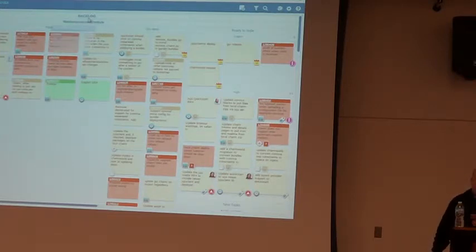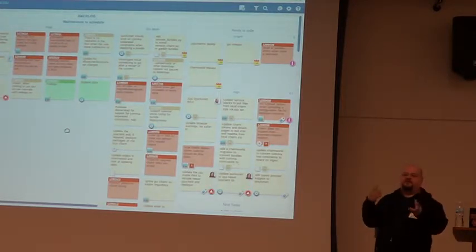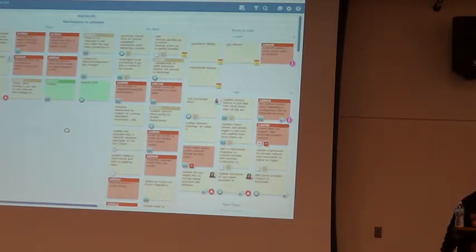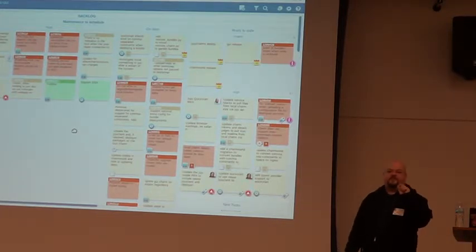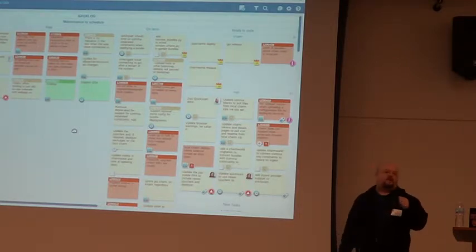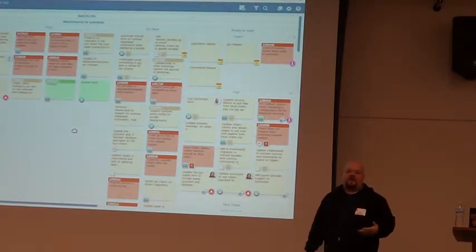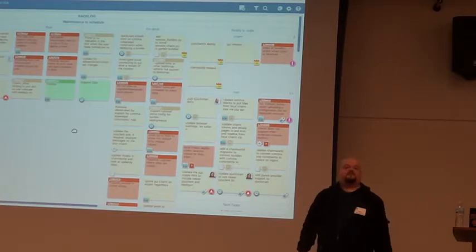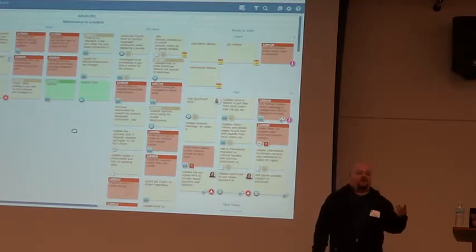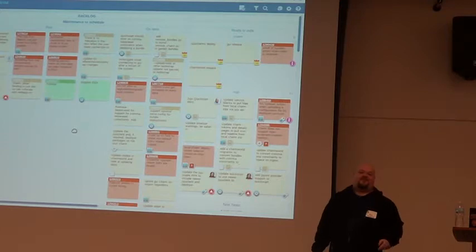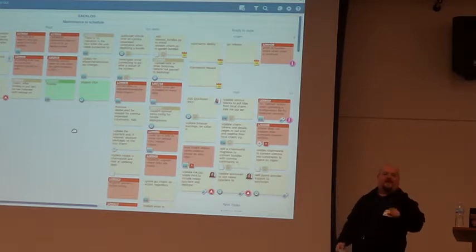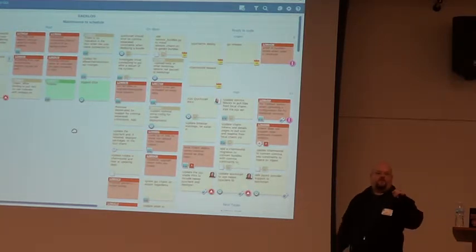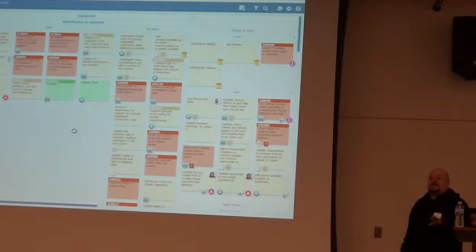So we're going to start in the backlog. And like any team... So I lead a team that's six or seven guys, depending on who's on paternity leave and not and all that kind of stuff. And so what we're actually working on right now is the idea of trying to figure out what is that magic number of items we can get done in a certain timeframe. So we're beginning to work on two week iterations. Where every two weeks we have what's called planning poker meeting. Where we run through a series of cards and the team together goes, how long will that take to get done? And the hope is that the wisdom of the crowds will come forth. And I say it'll be six days because I'm pessimistic. And someone else is saying two days because he's optimistic. And we end up agreeing somewhere in the middle that it's probably three or four days of work. And that's what we should pin on that card.